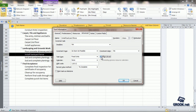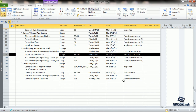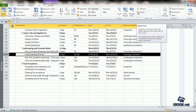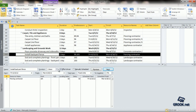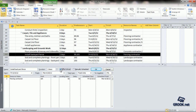Effort-driven scheduling is mostly applicable to resources which will be added additionally, or if there are resources which were once given and then unassigned. After we click the Effort Driven checkbox, we can click OK. The other way is that in the View tab and the Split View sub-tab, we can click on Detail View. In the task form which opens below, we can check or uncheck Effort Driven directly from here, and click OK.